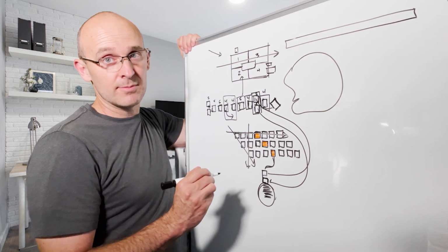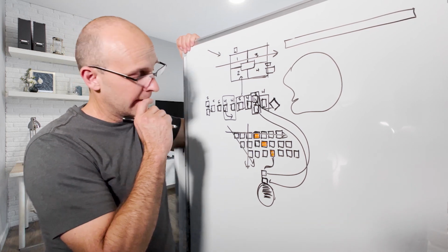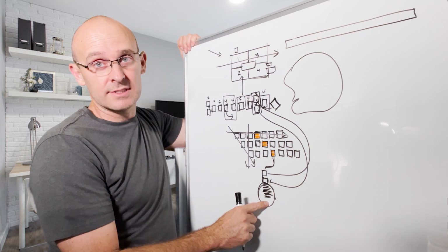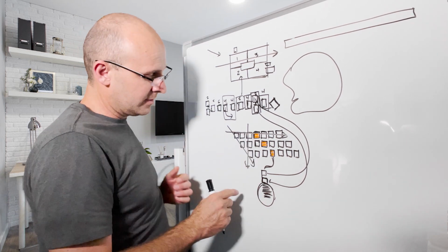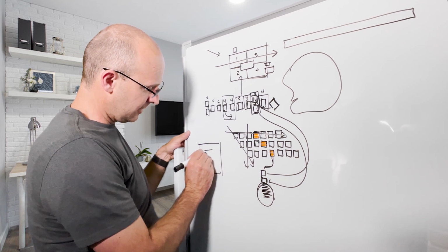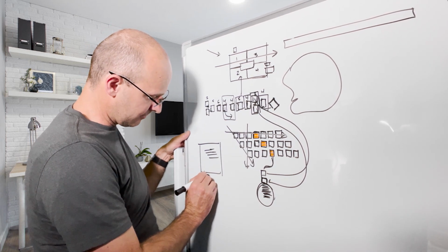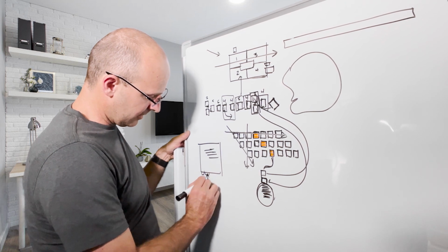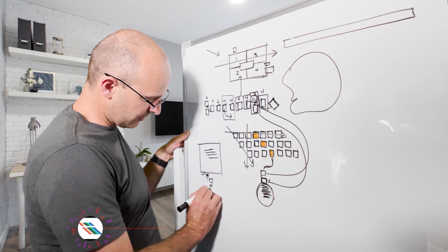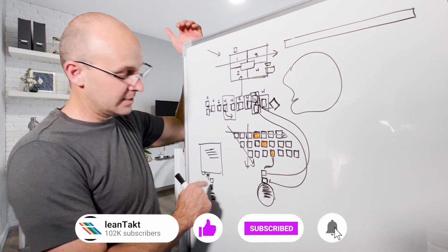Now here's where I'm going to blow your mind, and I think that you're going to love this just as much as I do. The genius of the system is in the work steps. So if you have an Excel template where you have your Takt plan on your one page, you can have another little tab at the bottom where it has each Takt wagon, your work packages, and then the work steps listed out in here. Okay, you can do this in Excel.